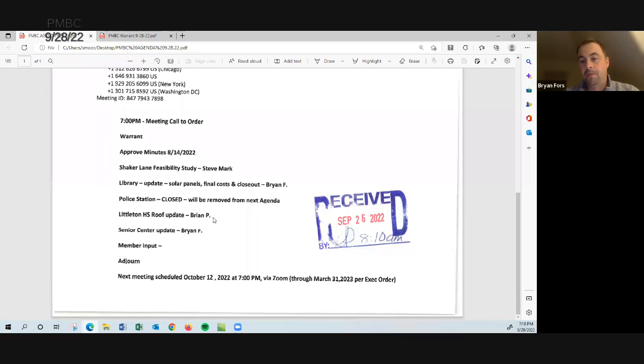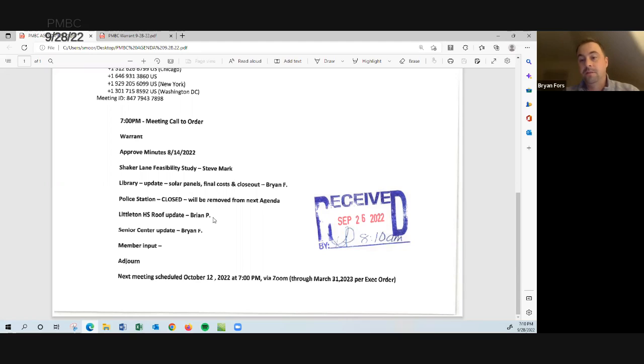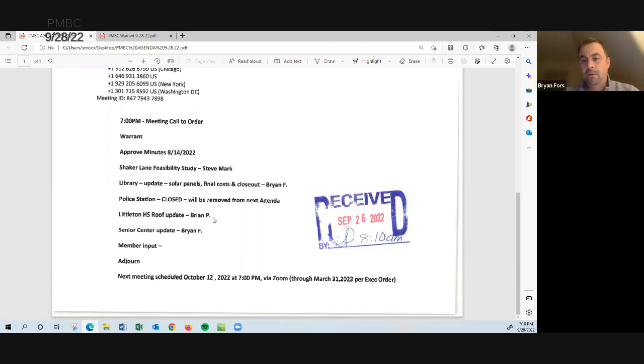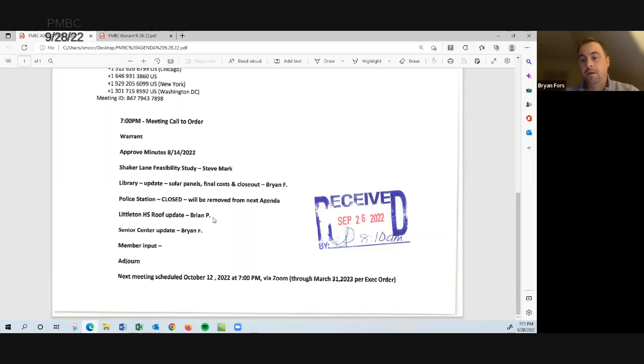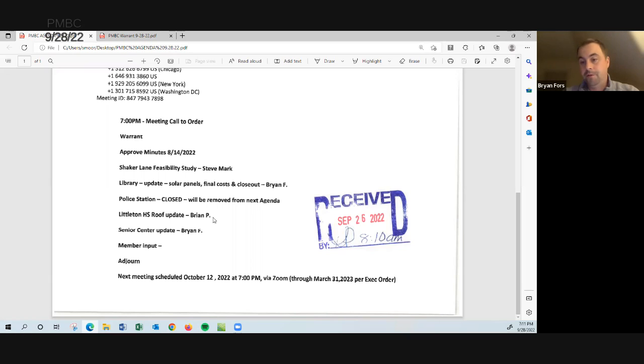I spoke with the accounting department regarding the checks that we do have for the remaining contract, that we had to do in order to make sure that we suffice the state grant. And besides that with final costs, I'm working with Sam Alvarez, the library director to get the final MBLC report going, to justify all of the final costs. And once the solar panels are complete, our lead study and submission can be done, in which there would be an additional MBLC credit that comes back from the state. Once we understand what our achievement is in the lead program, we're optimistic that we will be at least certified. The hope being that with the solar panels, it might be able to bump us up into the silver category, therefore giving us a little bit more kickback on the lead grant.